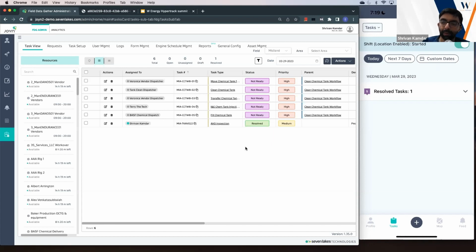So, I think we've learned that on our journey to our acceptance criteria, we have an agreement between engineering and product that unless the user flow is clear and the user expectations are clear, it can't get developed. So it doesn't go beyond a specific status in Jira, so to speak. So once those are clear, then it's on engineering to go figure out the right way to do it, whether it's a third-party thing or self-developed or some library or whatever it might be.